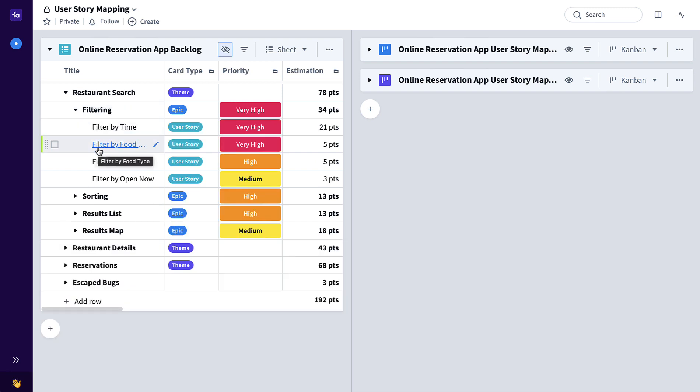A product backlog gives you an excellent way to prioritize by business value what should be worked on first as well as give sizing estimates, but it's not a good way to see how your customers are actually going to interact with your product. That's where user story mapping comes in.